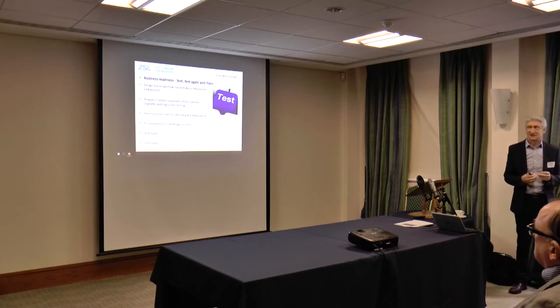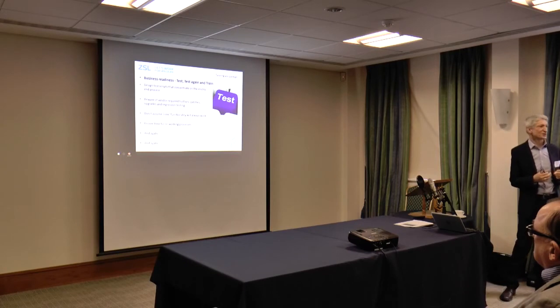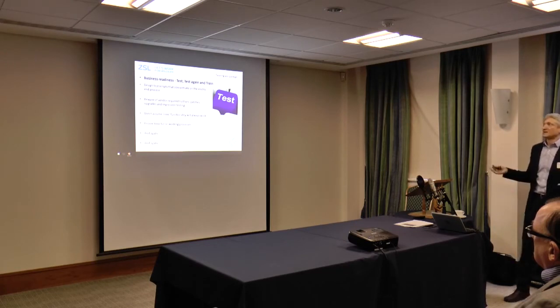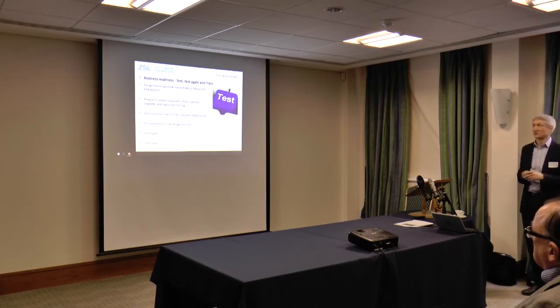Business readiness, it's getting near. You've done your configuration, you've sort of got your customizations, you've sorted out your patches, your hot fixes. There's a number of moving parts that are going on. You're not quite sure whether you're going to be ready. The business wants it all now. There are staff who aren't around. There are holidays. You've got to make sure now that you start testing it. Again, we used test scripts that were developed out of those 2B processes, and we concentrated on those as the testing process. So again, very much getting the users involved all the way through to say, does this do what you want to do your bit of the business?